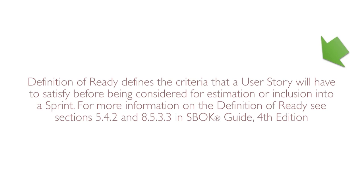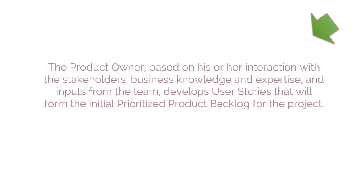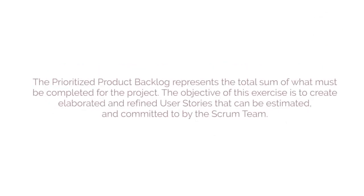The Definition of Ready defines the criteria that a user story will have to satisfy before being considered for estimation or inclusion into a sprint. For more information, see Sections 5.4.2 and 8.5.3.3. The tool that must be used in this process is user story writing expertise. The product owner, based on interactions with stakeholders, business knowledge, and team inputs, develops user stories that form the initial Prioritized Product Backlog.